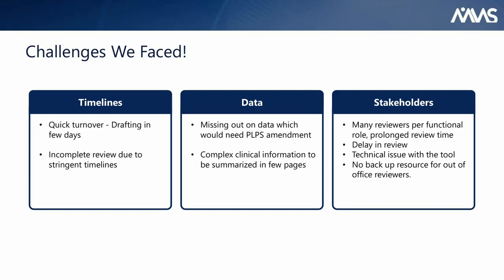In spite of the process to add 1 reviewer per functional role, many reviewers per functional role were added, which prolonged review time. Delay in review due to various reasons like technical issues with the tool, for example, appearance of error codes in the software, access denial to the tool, etc., were few of the challenges. And there were no backup for resource of out-of-office reviewers. Hence, we had to cancel the reviewer from the team review.